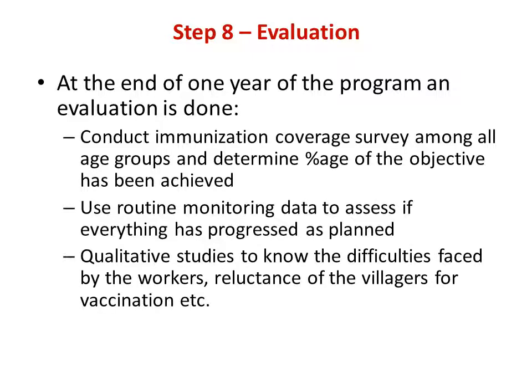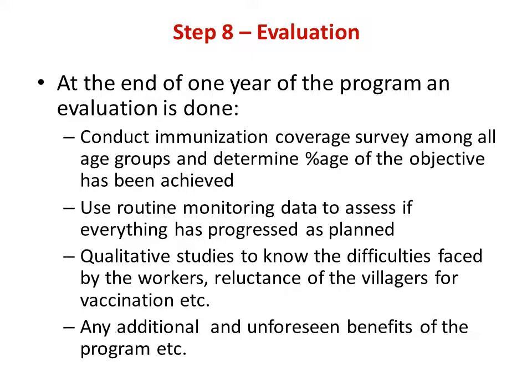We can conduct qualitative studies to know the difficulties that were faced by the workers, the reasons for reluctance of villagers for vaccination, and other problems. Any additional or unforeseen benefits are also noted down, and why they have occurred is also searched for. In other words, evaluation is an elaborate project which assesses each and every aspect of the plan of the program and assesses the performance of the program in every sphere and brings out the strengths and weaknesses and lessons learned and suggests recommendations.